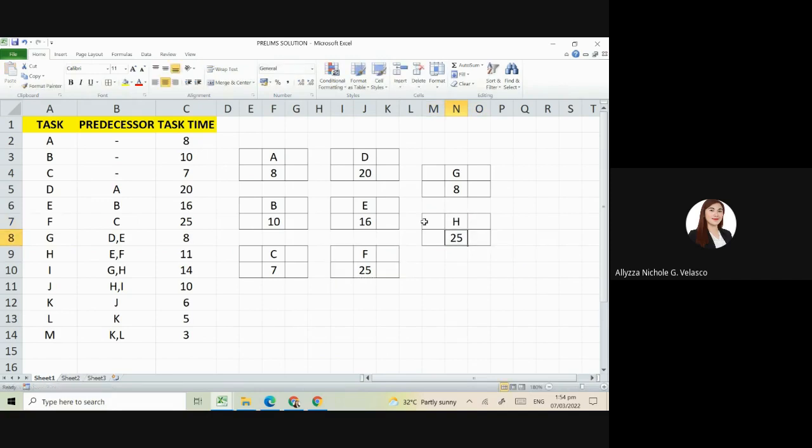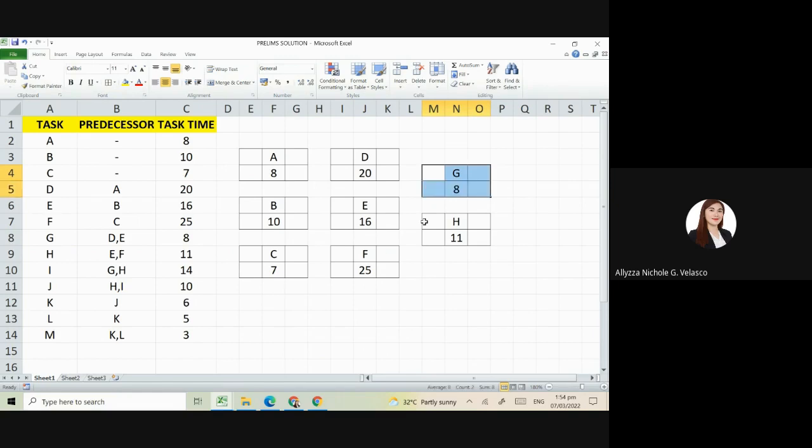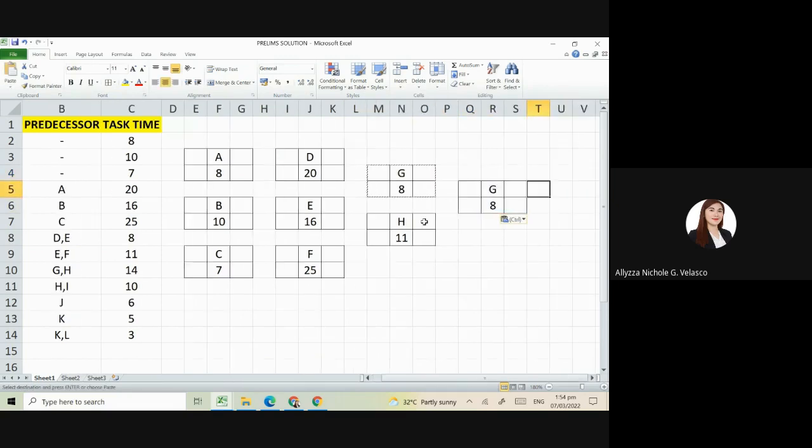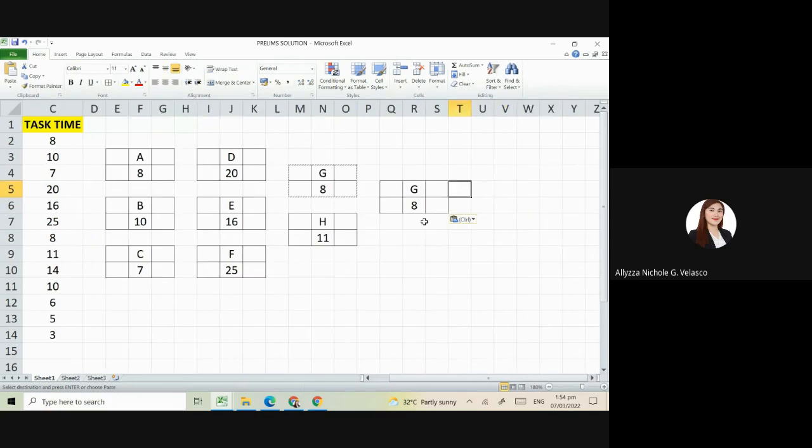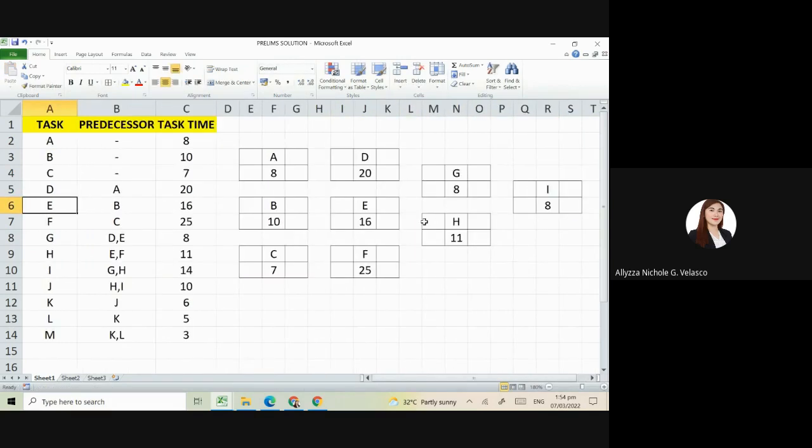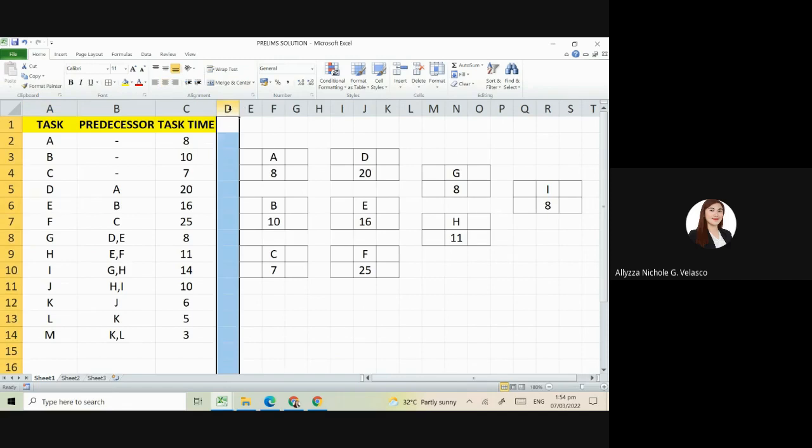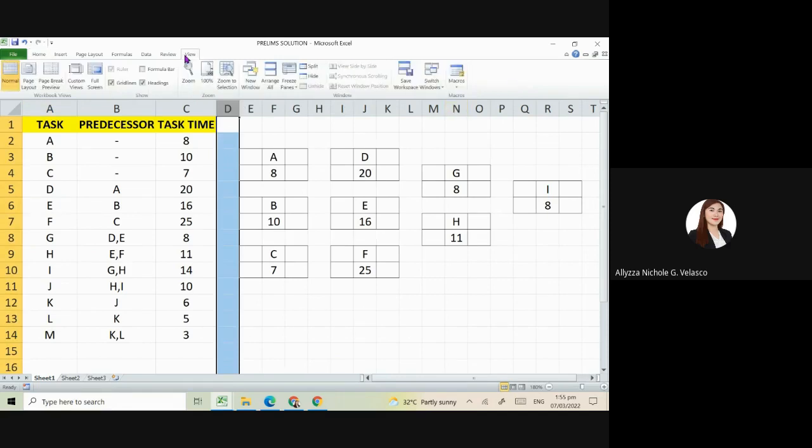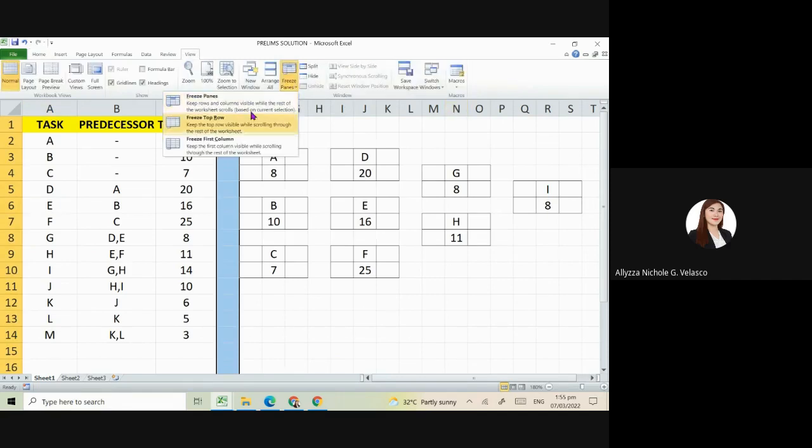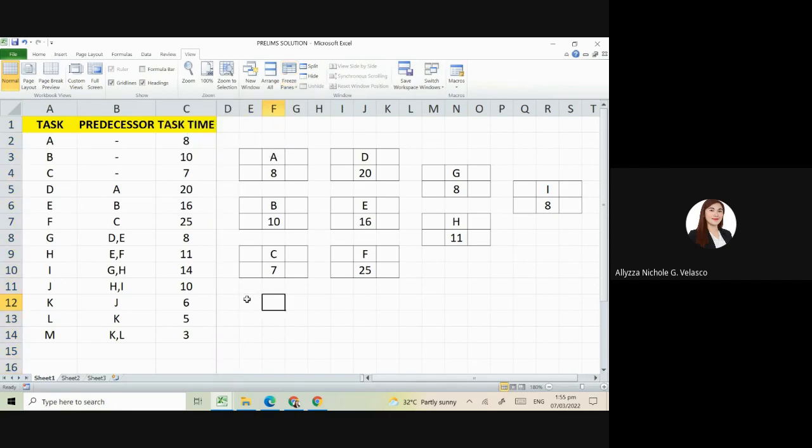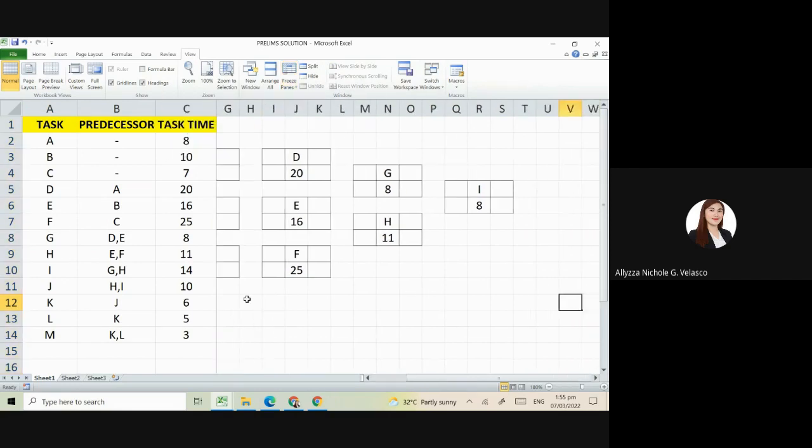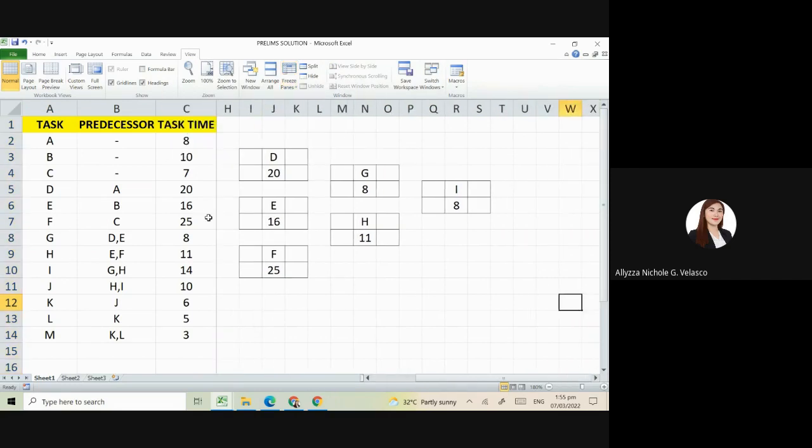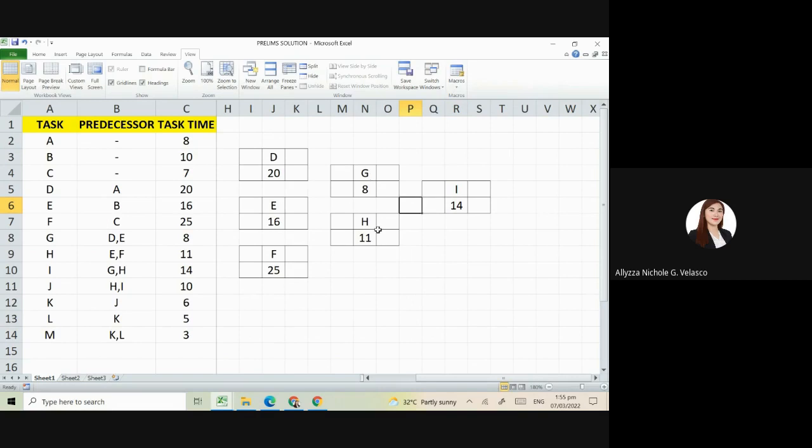Next is I. Its predecessors are G and H, so we'll place it here. Our I is 14 days. Again, its predecessor is G and H, so that's why we placed it here.